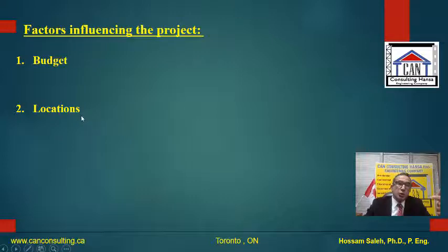It can also have an impact if your project is on the lakeshore, or far from the city where you can't easily get concrete from a concrete mix plant. In this case, you might go with a timber structure or steel structure. So the location of the project has a big impact on your building.